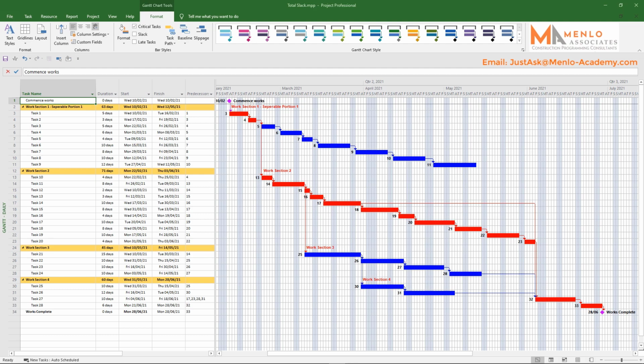path, which is the shortest chain of events that need to happen according to plan for the project to be delivered on time. If the total slack on a task gets eaten up by delays or other issues, the forecasted finish date for the project will be pushed out. An effect to the finish date may not happen suddenly either, as the effect of losing slack on tasks can accrue slowly from the start of the project.